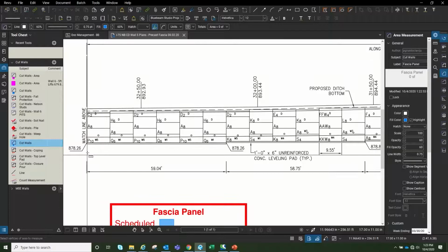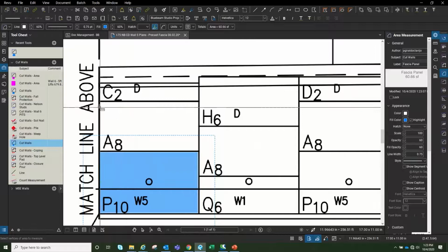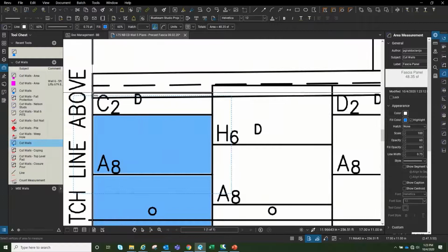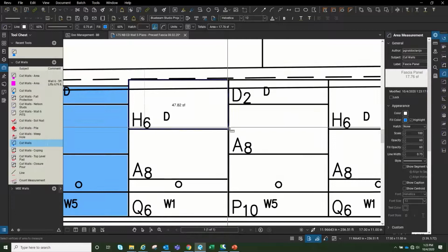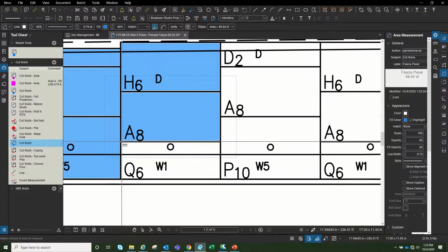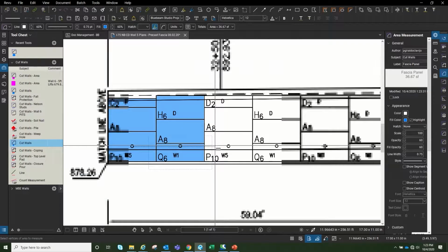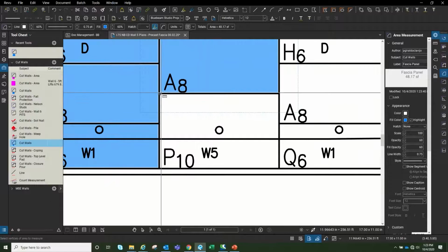This is the precast panel. So these are all precast panels that get delivered to the job site for a facial wall. So I'm only going to do this for a few since the steps are always the same. The first thing that I do, before we start any work on this activity, is I get the plans and then I do a takeoff as you are seeing here. So I'm just going to do it for these 3 columns, all the different panels that are going to be ordered and delivered to the job site so the crews can install them.